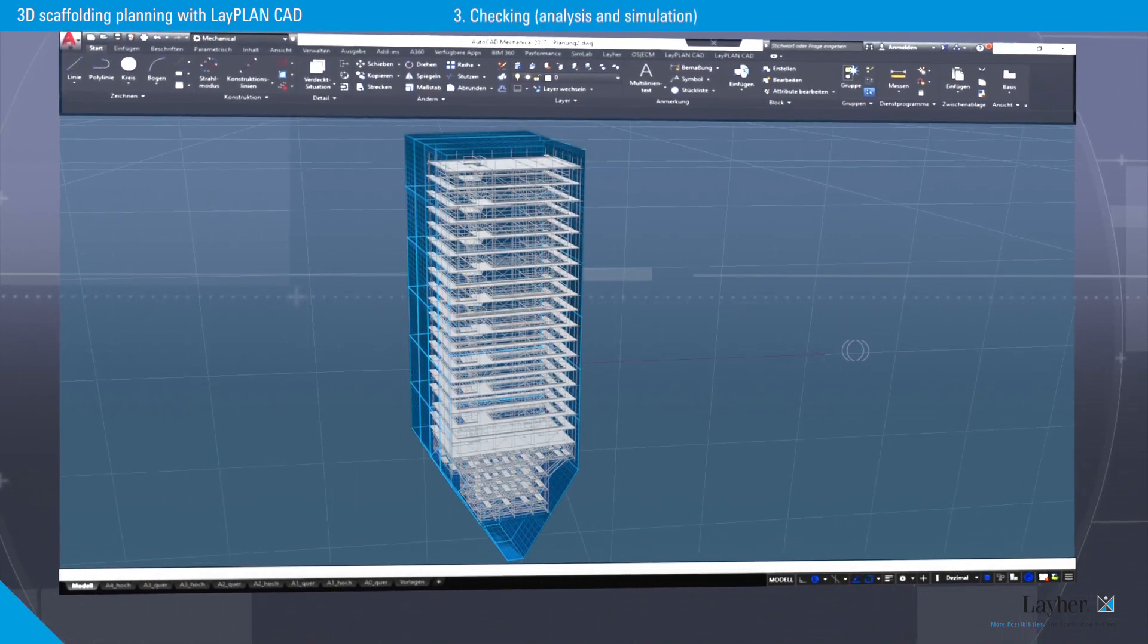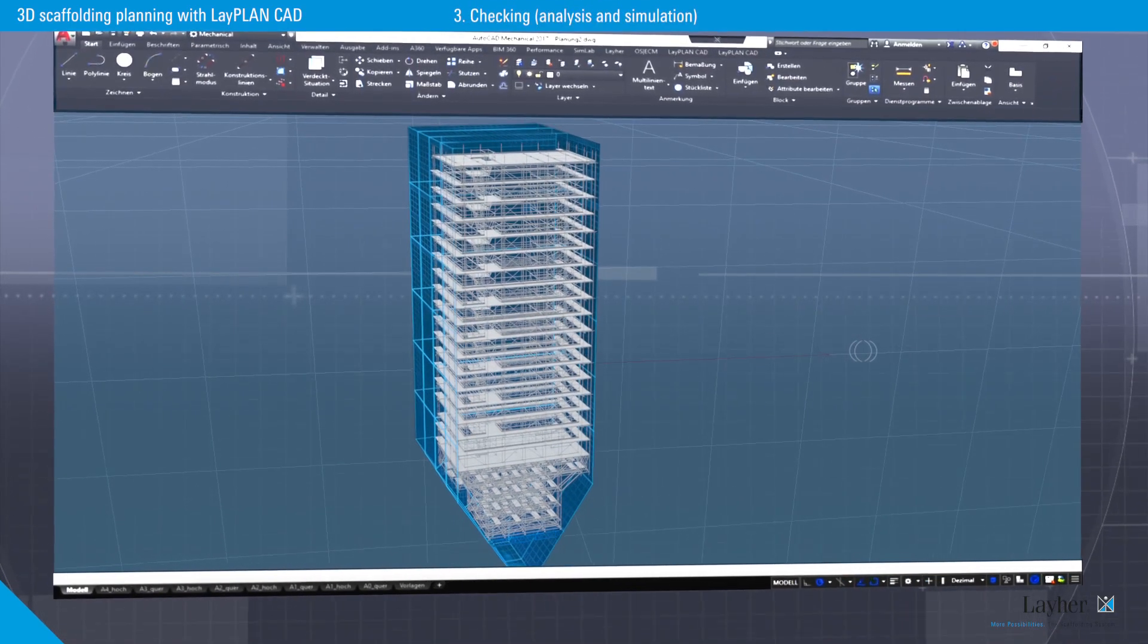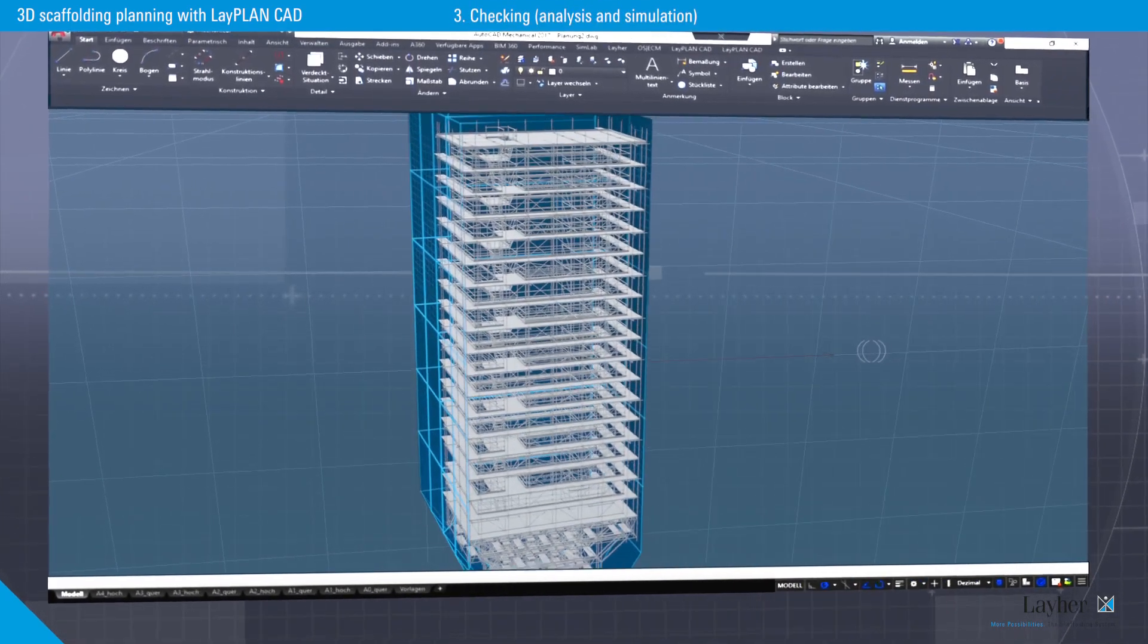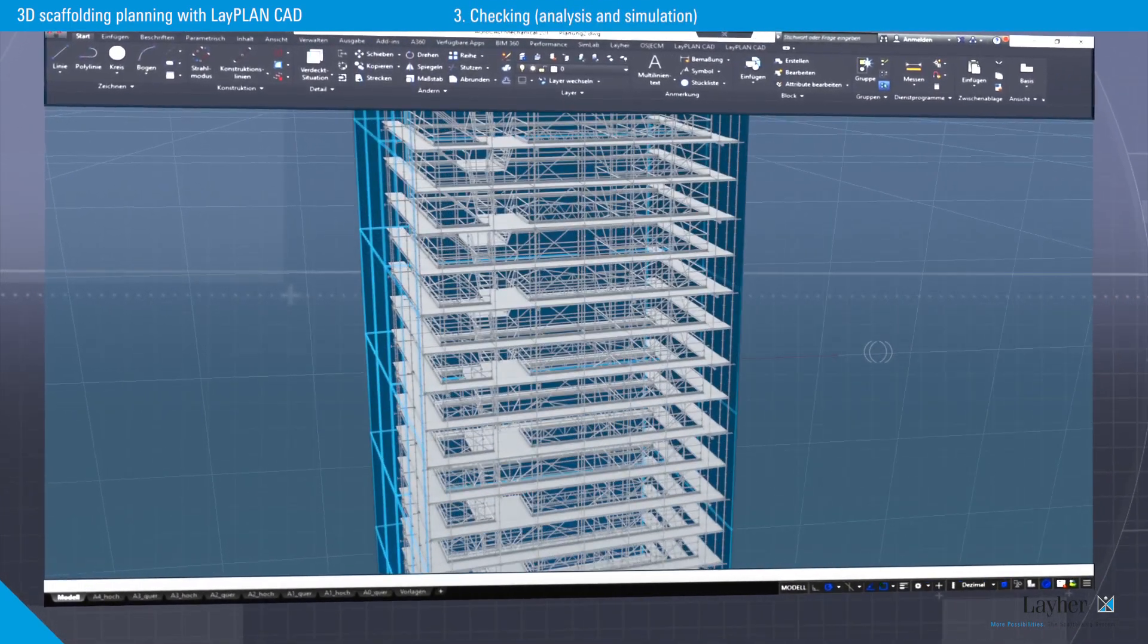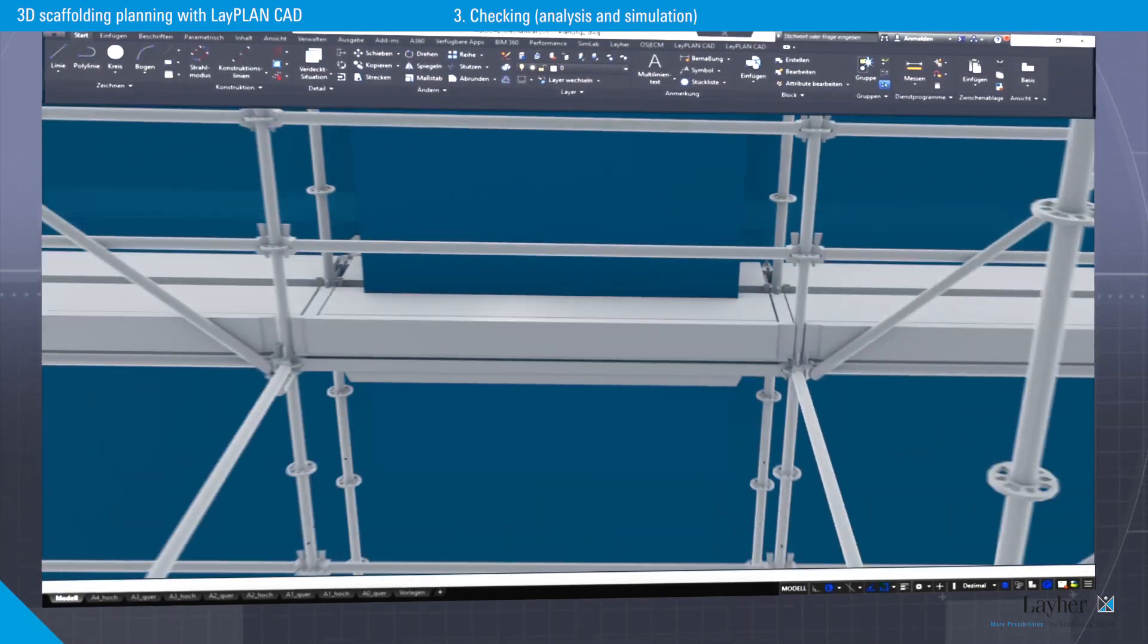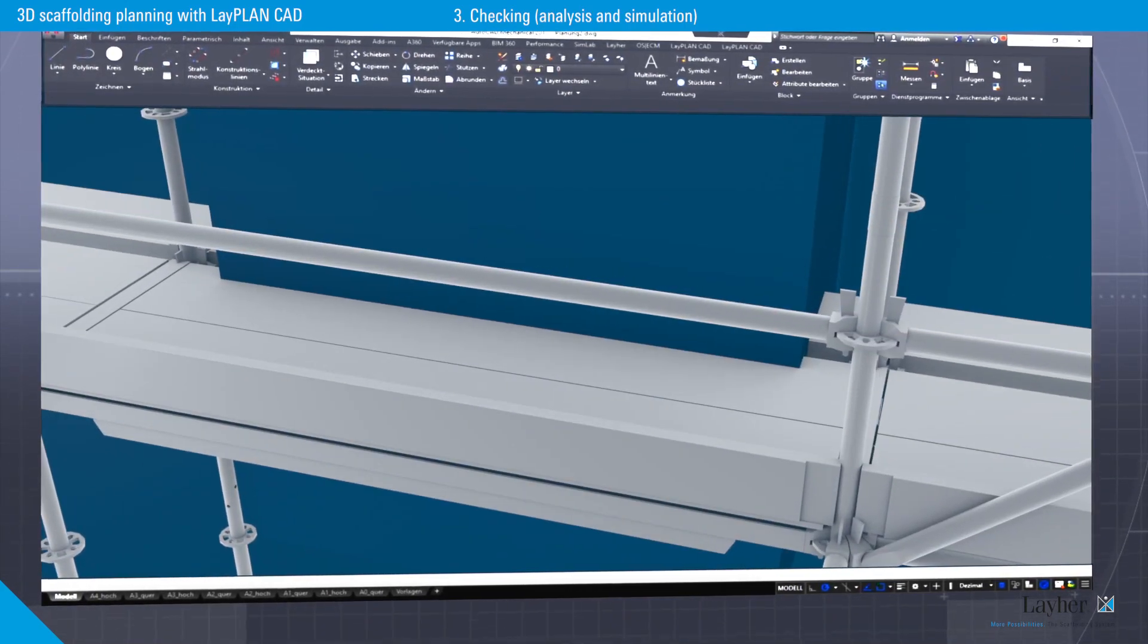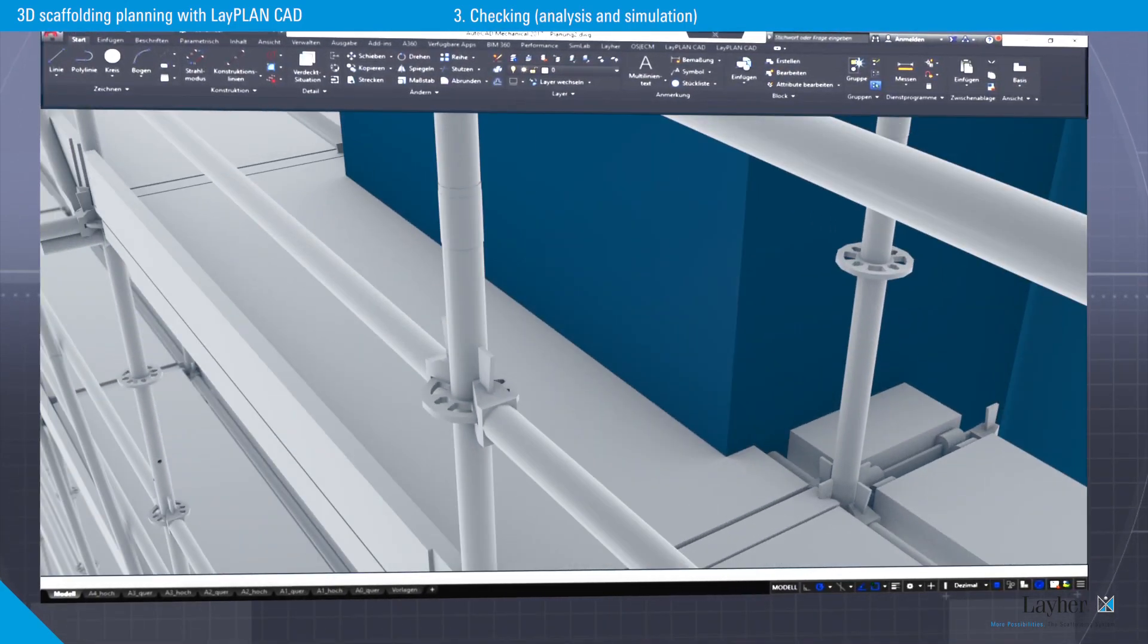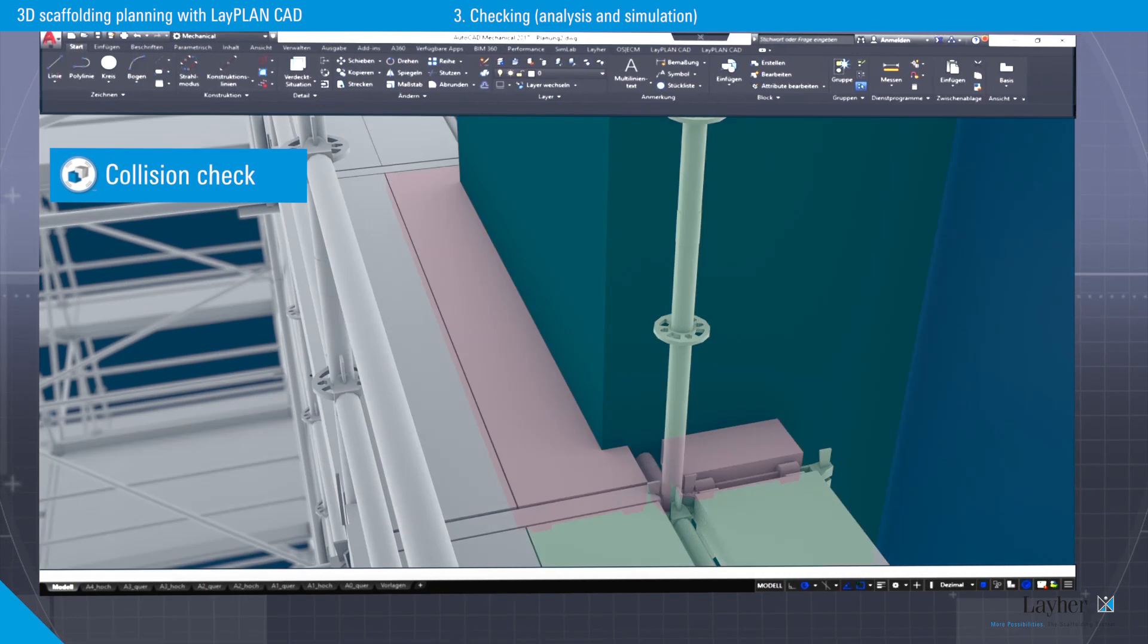Potential design errors already become evident during scaffolding planning in LiPlan CAD. The simulation permits a collision check.